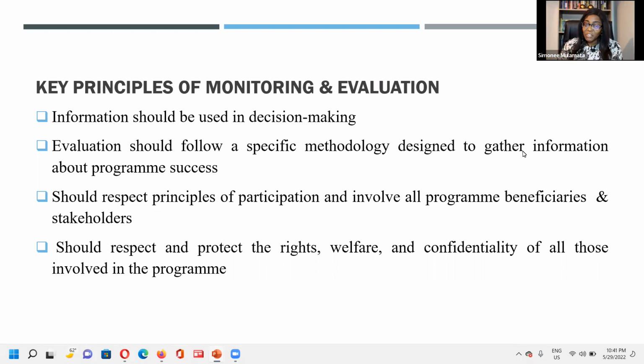We budget for such. We also do, like I said, focus group discussions, because that is where your qualitative data comes from. If your methodology of data collection is qualitative, then you will do your focus group discussions. And when it is quantitative, you want to go into systems, you want to go into records as well. And then also, when it comes to the methodology, we also look at secondary data and primary data. In your secondary data, you want to talk of literature reviews or any form of reports that exist with regard to your programs and your field within which you are collecting data from.